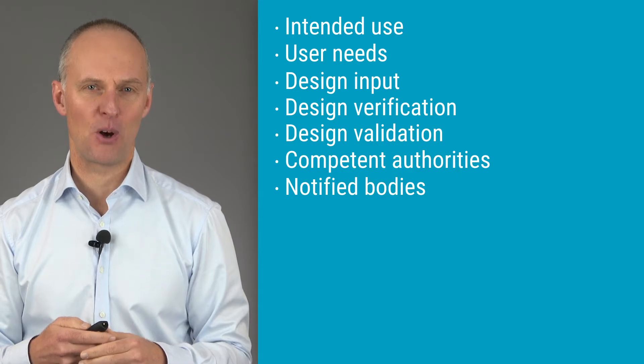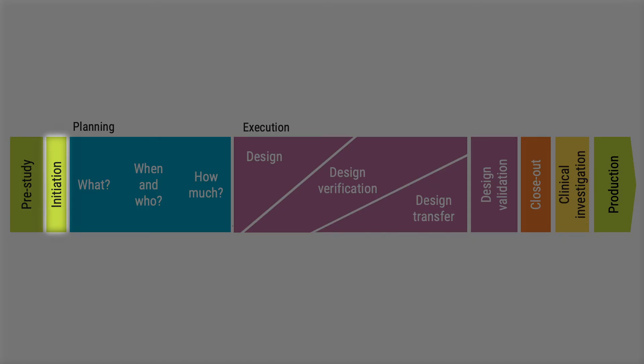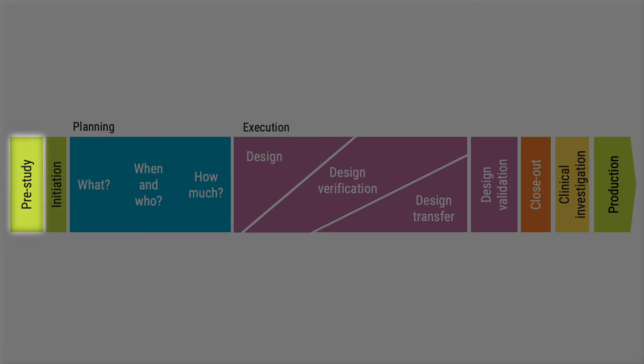Let's take a look at the product development process using some of the terminology you have learned. Projects should not start at random — formally starting a project is usually referred to as initiation, which could be documented in a project charter. If there is too much uncertainty to make a relevant plan, you should consider running a pre-study — also called a feasibility study or concept study — before starting planning. The purpose is to decrease uncertainty to a level where it is appropriate to start a project under design control.